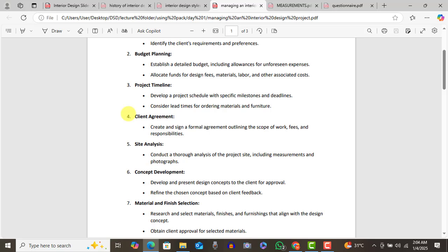communication should be something that you can track. So you go to site, you and the client speak, you want ABCD. When you get back to your office or home or shop or wherever, send them a message: so you want us to do this at this place like this. Let them respond to it with a simple okay through WhatsApp, email or something. So that tomorrow when you use green and they say, oh, I didn't say I wanted green, because green can become blue, you can just pull out the WhatsApp or email and refer to it.